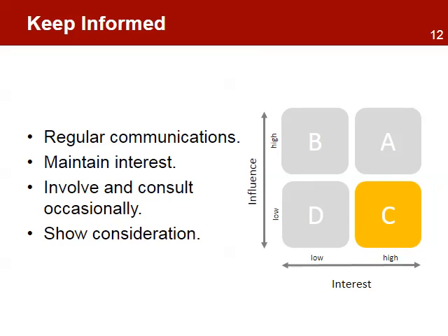Category C stakeholders have a lower priority. They have high interest, so they can be good supporters of the project. The project manager can send them communications on a regular basis and find opportunities to maintain and sustain their interest by involving them in low risk areas and consulting on decisions that will impact them.